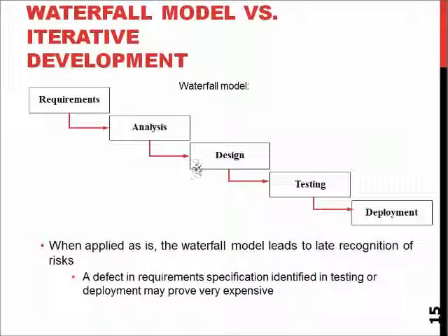You are working with diagrams and designs and stuff which doesn't exist yet. So if you want to make changes, you more or less can just make a change in your plan, and it works that way. When you have developed something and find a problem, for example in testing, you would have to make the change so that all the existing components which already have been developed, programmed, and quality assured, tested for that they actually function, you'd have to do that testing work all over again to make changes in one module.